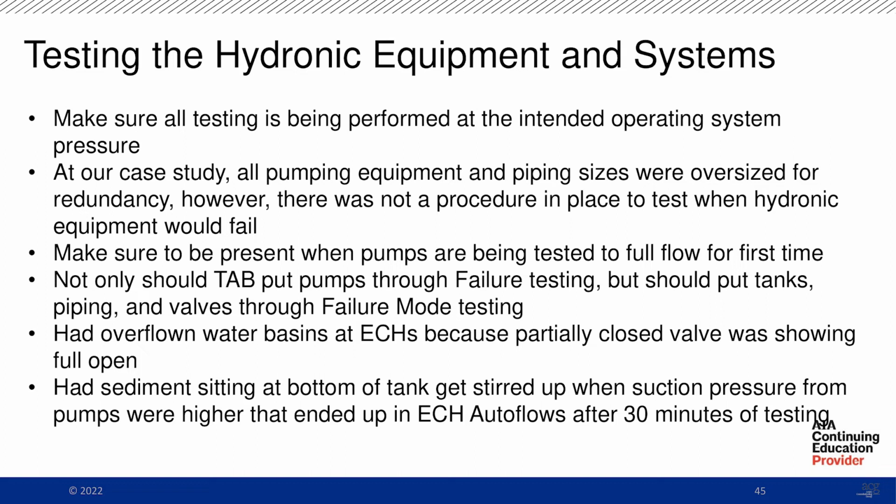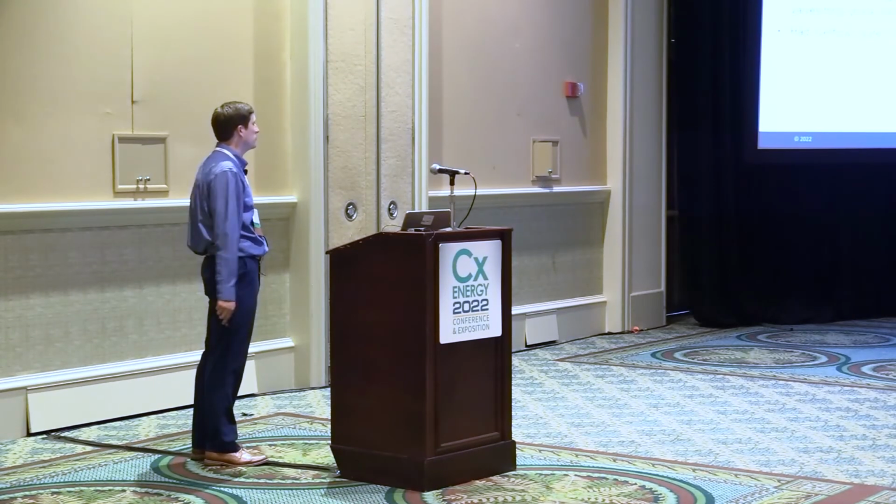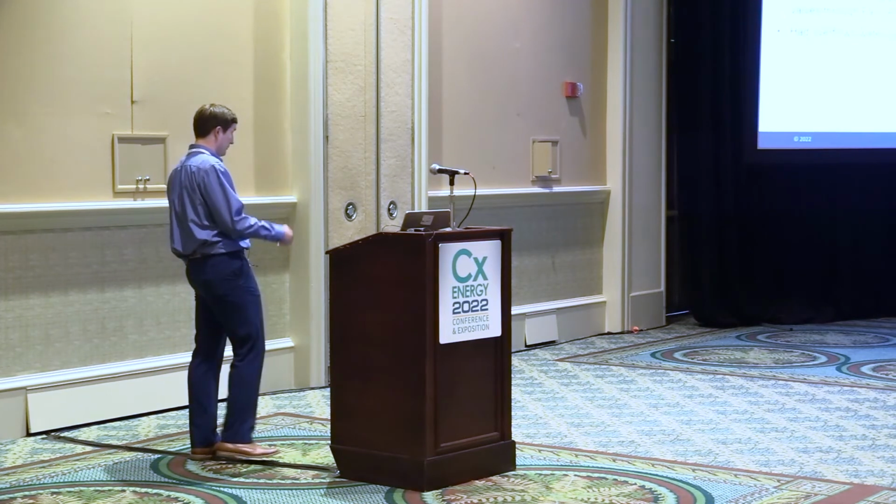As I was saying earlier, not only should we put pumps through failure testing, I believe we should also start putting tanks, piping, and valves through failure mode testing. We have overflowed water basins at ECHs because we had partially closed valves that were showing full open.